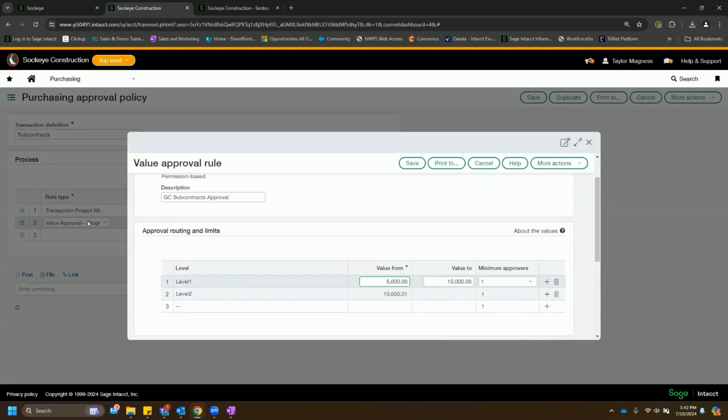In this case, we're essentially saying PM or project manager is my step one. After that approval comes through, it would look to this step. Anything under 5,000, we're saying we're fine. We don't need subsequent approval after our PM approval. Anything between 5 and 10, maybe we want one level 1 approver. Anything beyond 10, maybe I want 2 level 2 approvers, and these are all set at those roles. But really, really open to us to kind of build these out during the implementation phase.